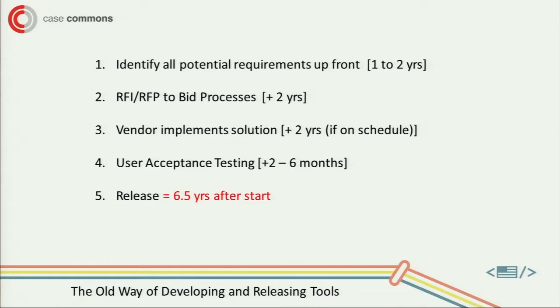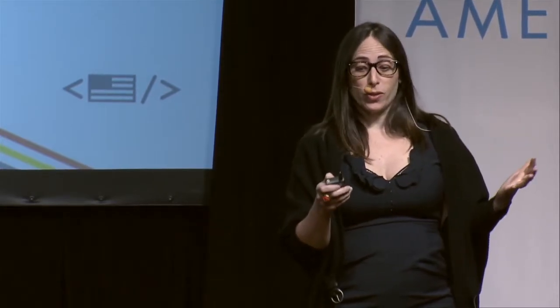The process they have today is: identify all potential requirements up front, spend a year or two writing a thick requirements document, then do an RFI or RFP process to get to bid — that takes about another two years. Vendors implement the solution once selected. The process was designed with control and efficiency in mind, but it almost never leads to that. Users get involved at the very end, and you're releasing about six and a half years after you defined what was going to solve your problems. So it leads to systems like this.